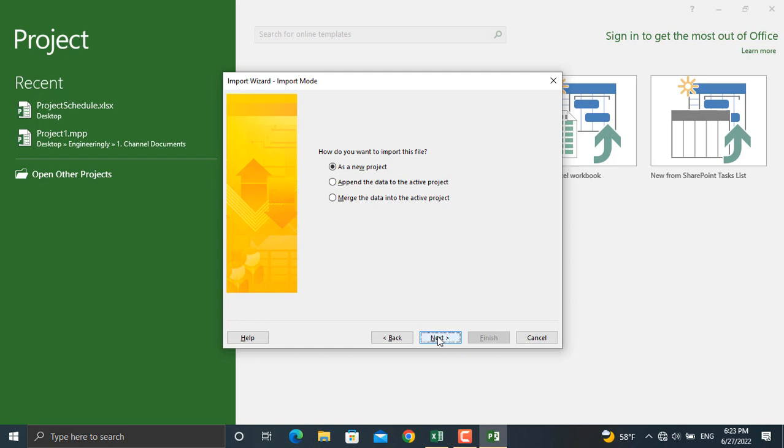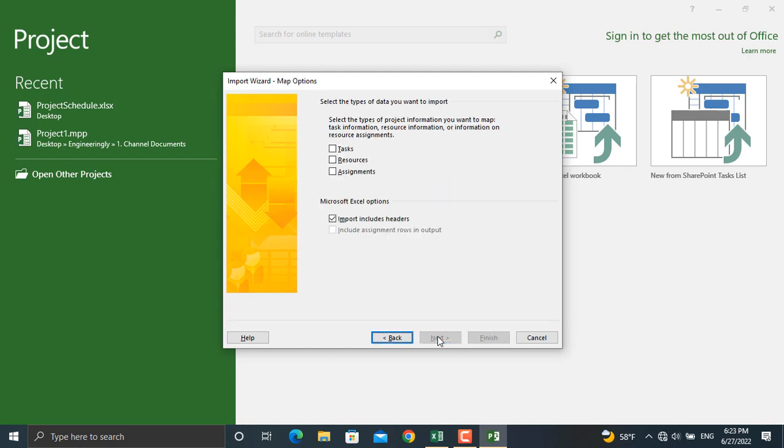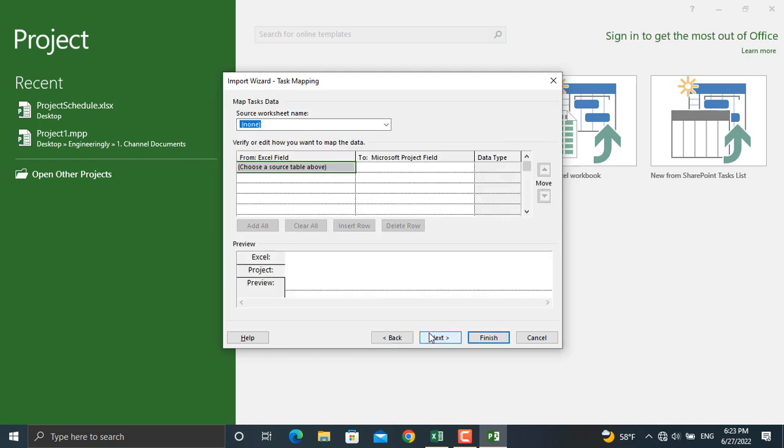Then, how do you want to import your file? We will import it as a new project. If you have, for example, another project where you want to merge that Excel file into that project, you can use the other options. We will use 'as a new project,' click next again. Next thing is select the type of data you want to import. We will click the tasks since we want to import the activities along with their details. We'll click next again.